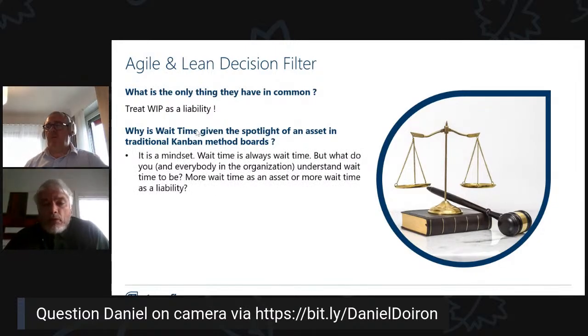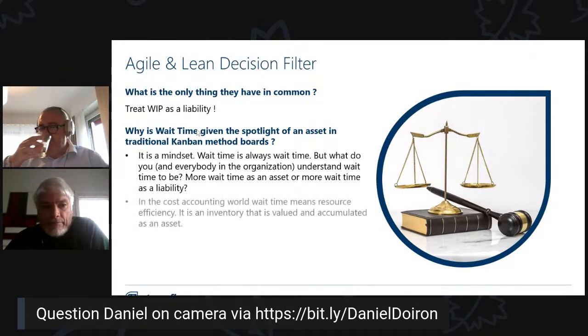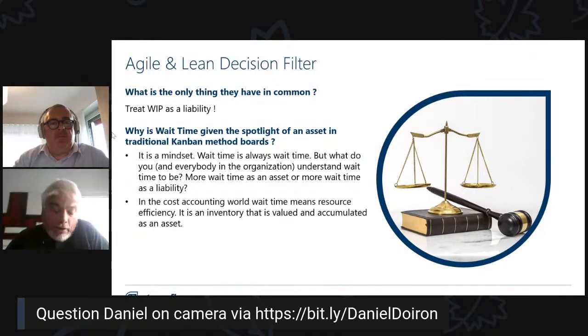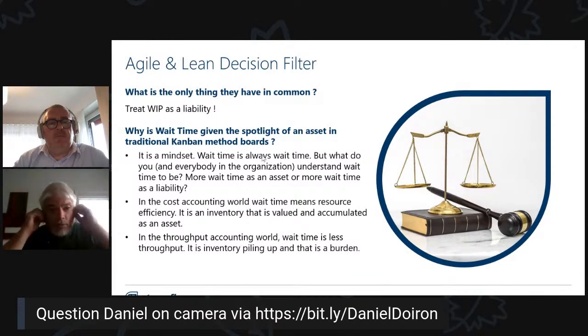Wait time is wait time, but what do you and your organization think of wait time to be? Is it an asset or a liability? In the cost accounting world, wait time is an asset because it means high resource efficiency. We have a silo mentality, and high resource efficiency means that all the resources are working hard, and that's good. But in the throughput accounting world, wait time is less throughput. Inventory that is piling up increases operating expenses, and it is a burden.